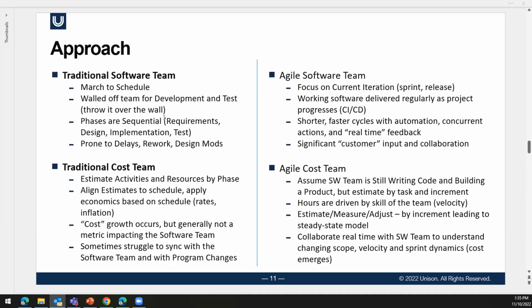And in fact, that could inform how many days this one might take, or what the team size should be, or where we can get economies with the rates that we're going through. So it just becomes another good source of tracking data and metrics, because you're looking at maybe just one sprint or one release into the future. You're not trying to pick a factor that's going to take you out for 6 or 8 or 10 months. You're going to adjust it every 30, 60, 90 days, whatever. I know the tendency nowadays is releases moving into about 30-day windows. So it's just another bucket of really useful data that can turn out metrics that will help guide the planning and the execution of the program as you go from iteration to iteration,